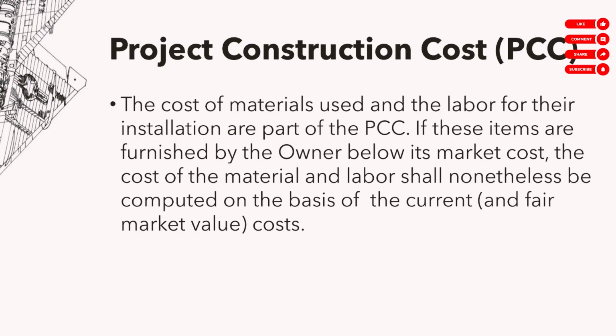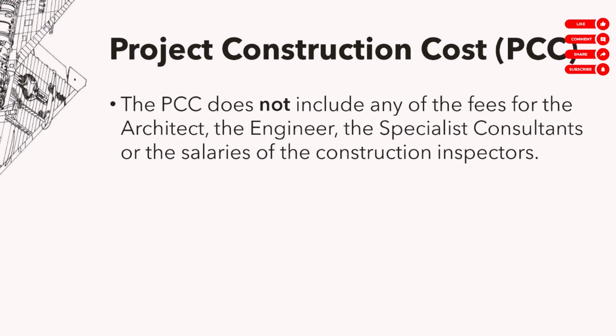That's why, kapag may mga discounted material, discounted labor na nakukuha si owner, as far as the architect is concerned, they should be computed on the basis of fair market value. Ano ba yung fair market value ng CHP, ng yero, etc. Para naman fair yung makukuha ang fee ni architect. That's all we're saying here.